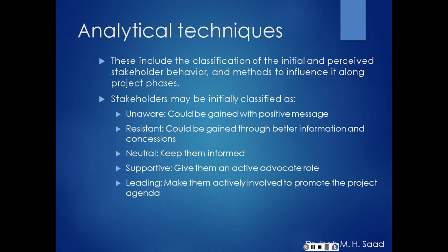If they're neutral, keep them informed. If they're not going to move to support the project, at least keep them informed about the development on the project. If they're supporting, give them an active advocate role, not only to be verbally supportive, but we want them to be actually supportive of the project through actions. And finally, if they are leading, make them actively involved to promote the project agenda. You want to gain them on your side.